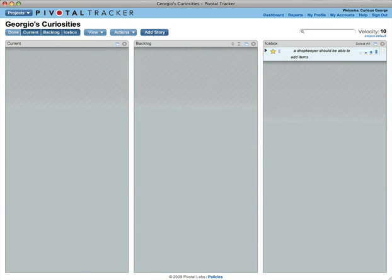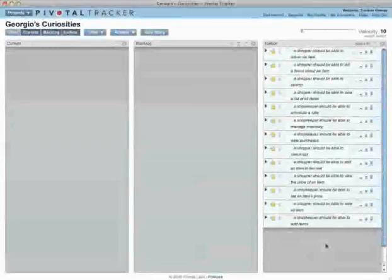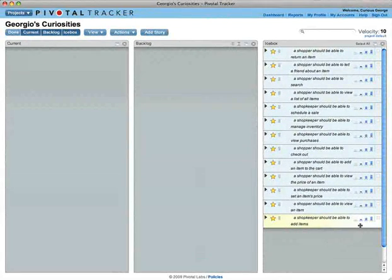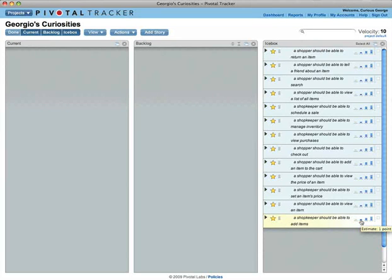Before you can start a story, you must estimate the difficulty of completing it. This is what enables Tracker to observe how much work you complete and to predict how long the various parts of your project will take.